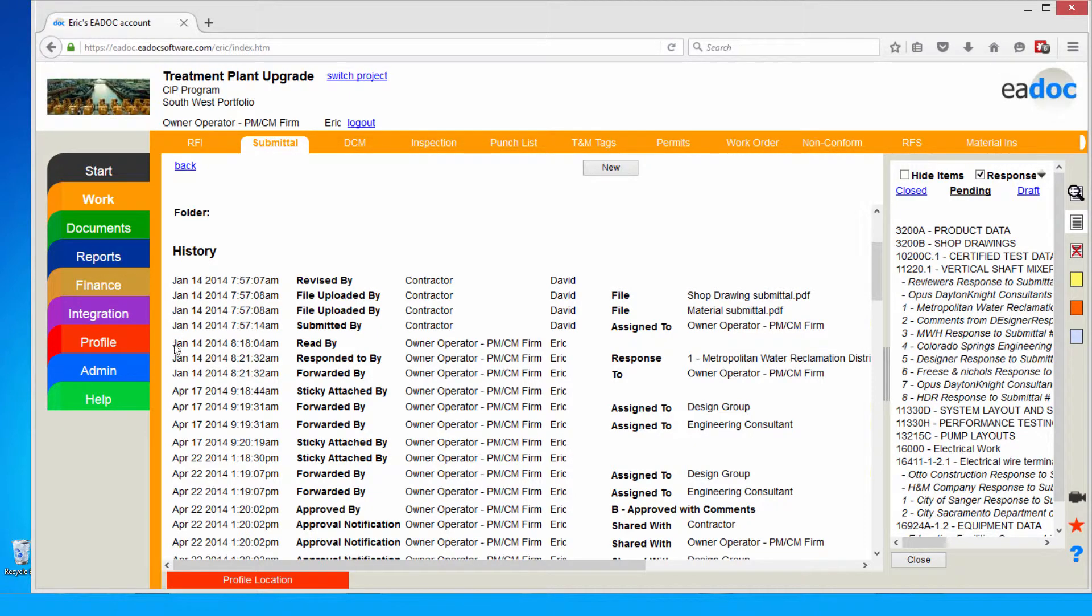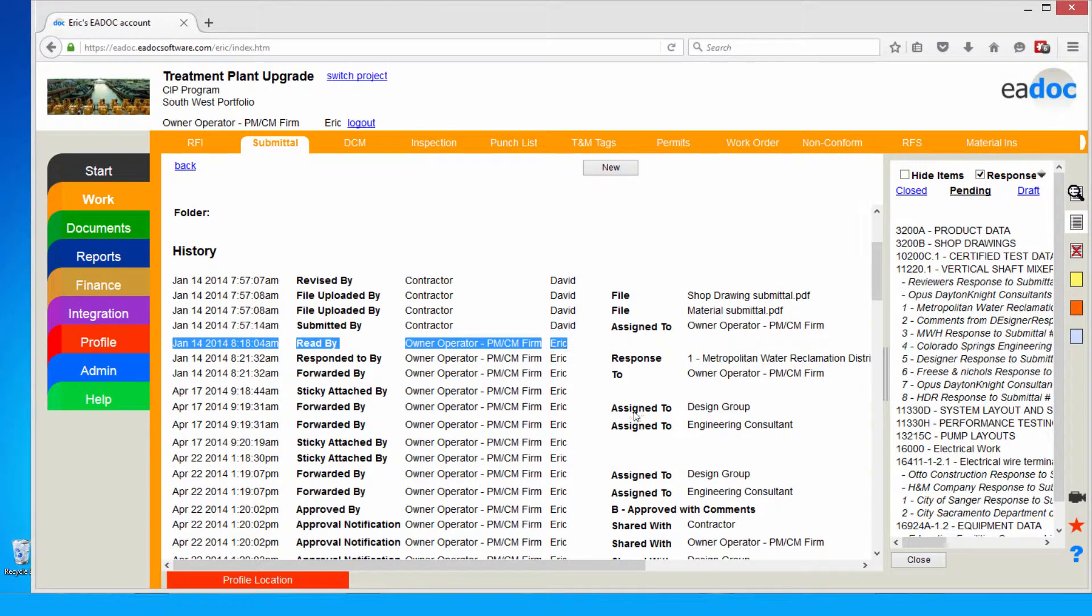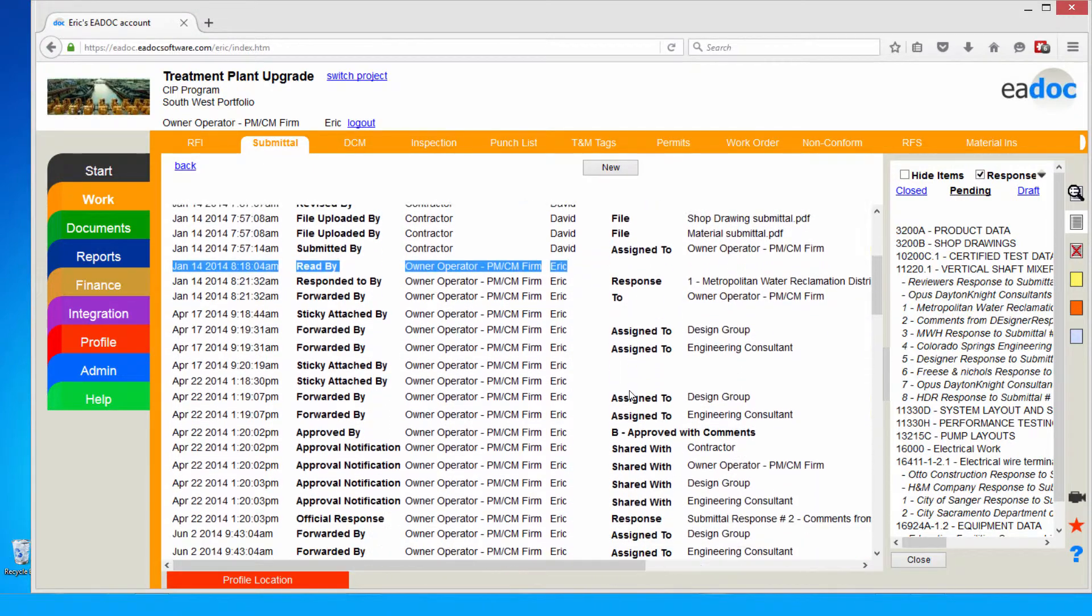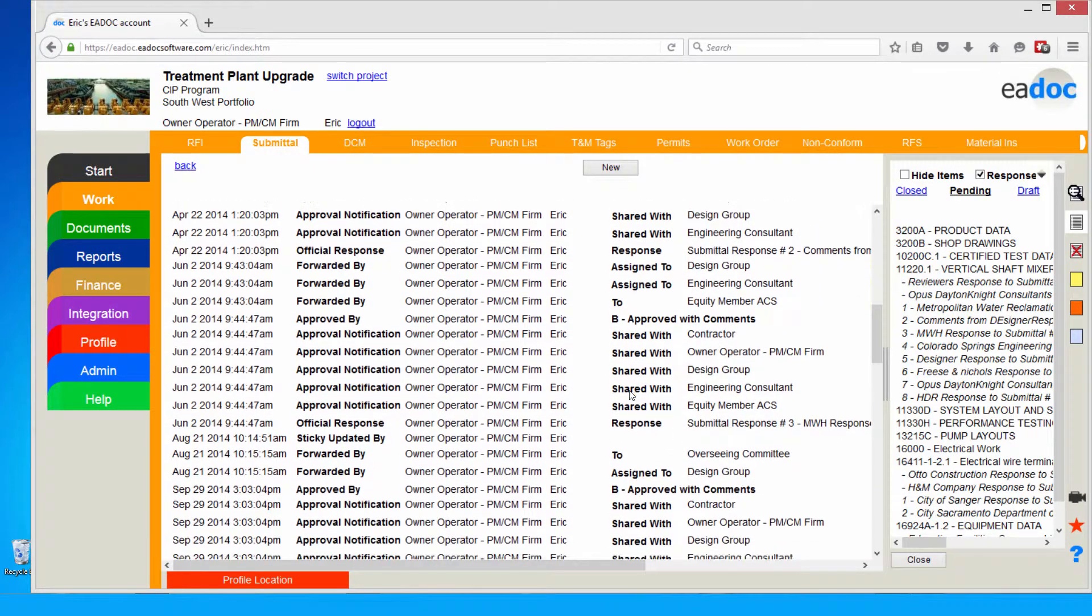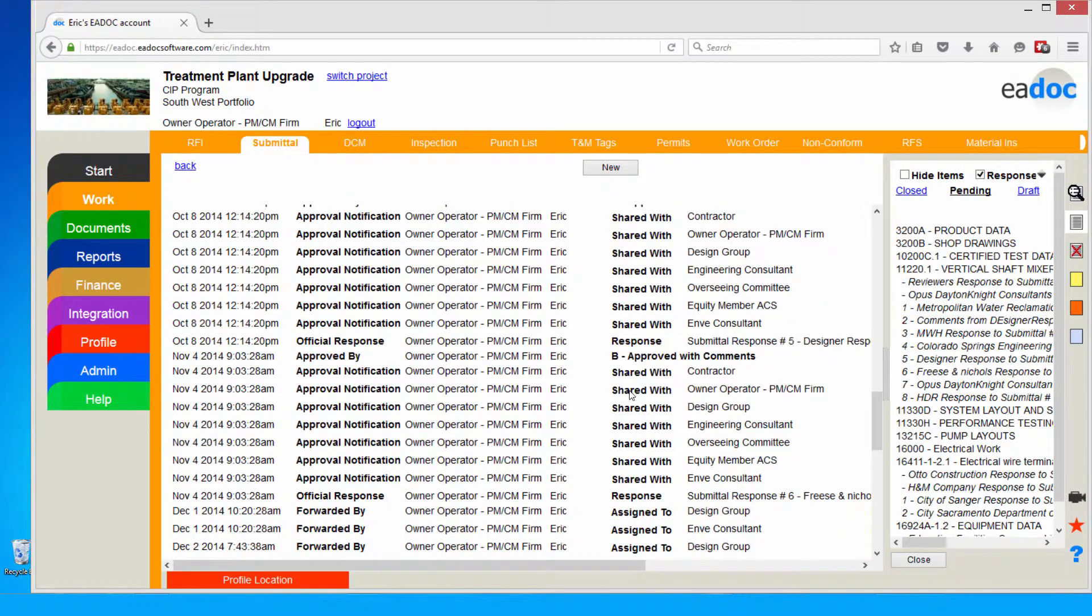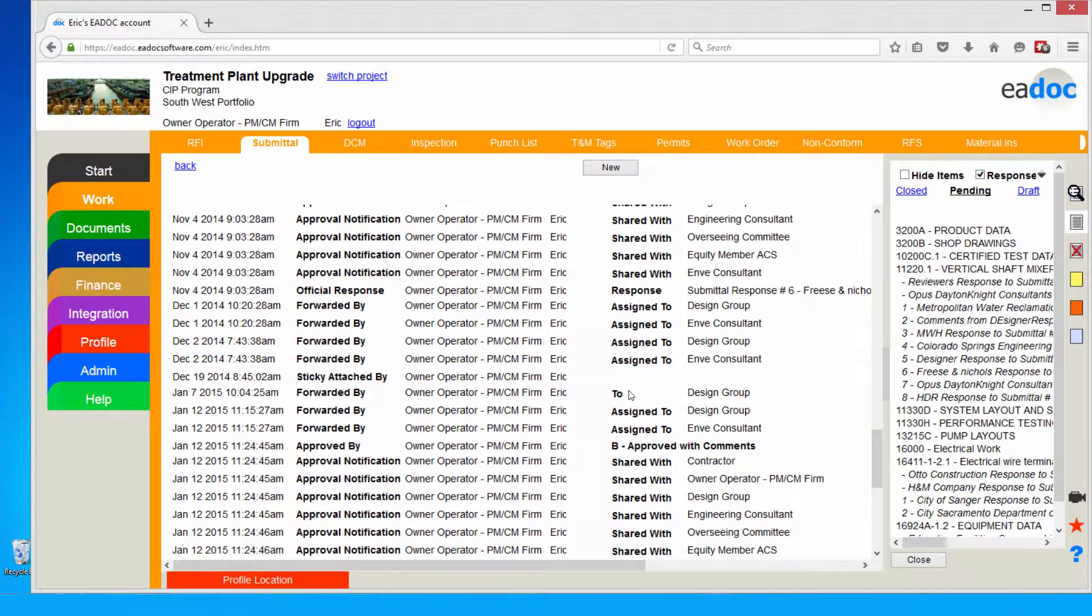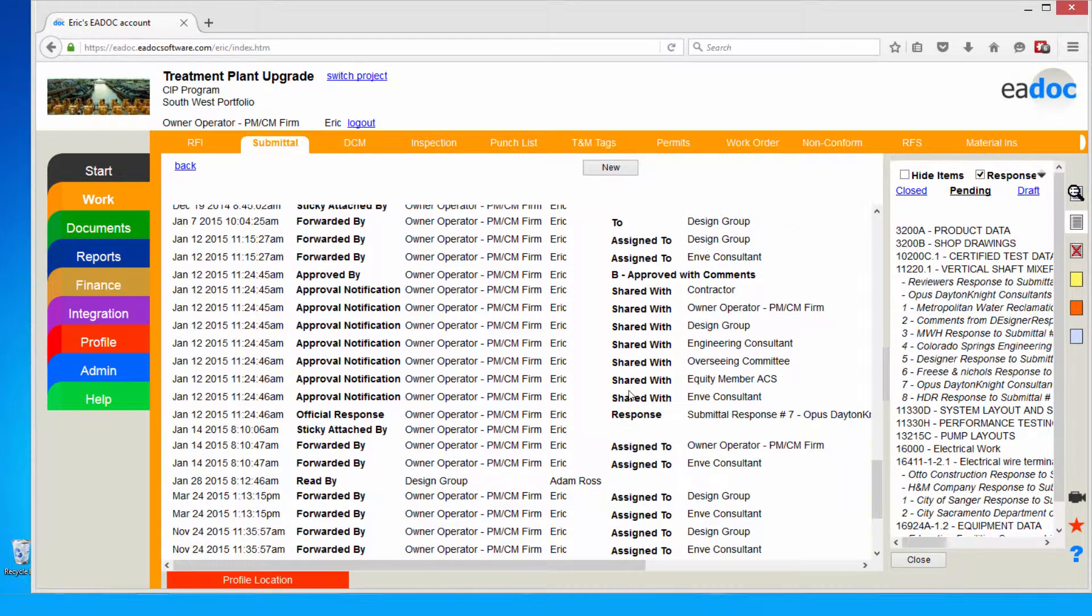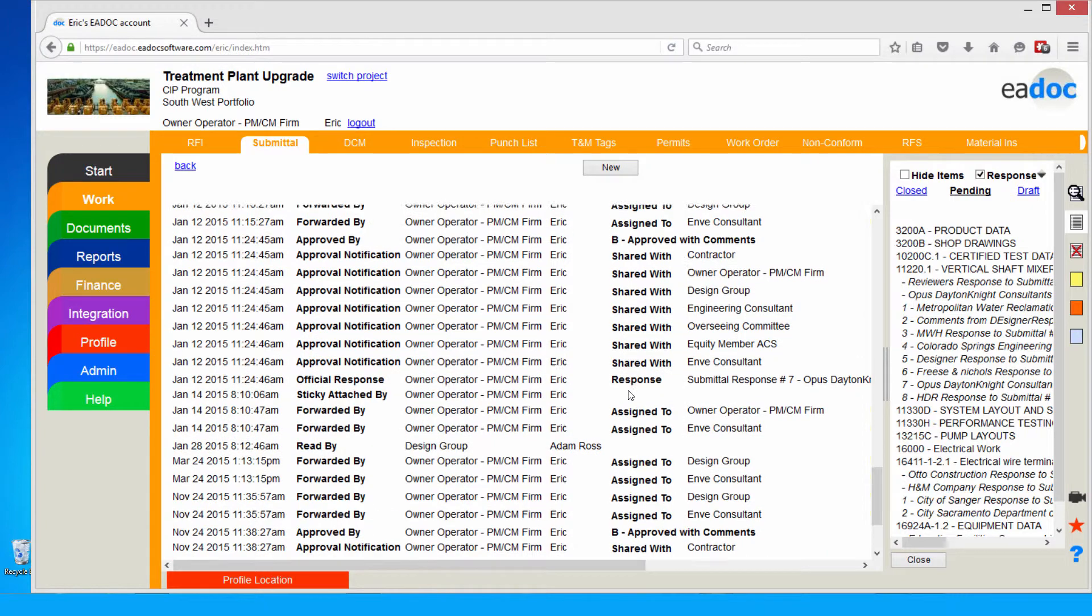When we take a look at the audit trail, the beauty of going electronic is this is all done electronically for you. There's no manual intervention. Nobody has to maintain an Excel spreadsheet. It's a very robust audit trail, all the way down to the read-by entries. This way, when my contractor turned in that information, they can tell when I read it here, who I passed it off to, the ball in courts, notes that were attached to it. It's all logged automatically here for you in the system. And it does it down to the second. This is a very powerful tool in keeping the team honest and identifying if there's any claims do come up on the project, what happened when. There's a very robust audit trail behind it here for you.